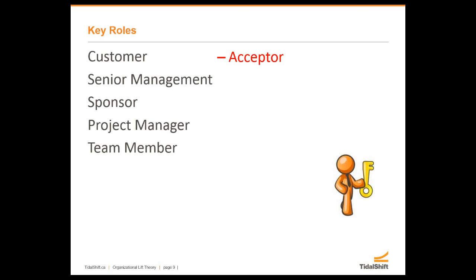When Greg needs to accept the deliverable, he's playing the role of customer. When I need him to increase funding or support to overcome a barrier, he's playing the role of sponsor. The role of the customer is really the acceptor. We want to make sure that acceptance criteria has been defined at the beginning of the project, because we don't want to get to the end of the project and have the customer say that's not acceptable due to criteria we didn't know about.